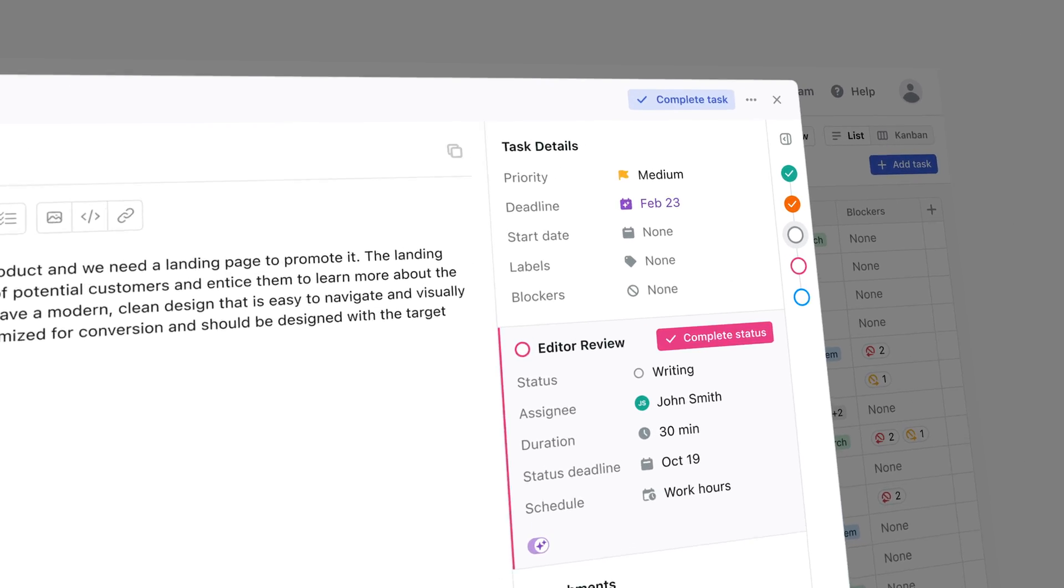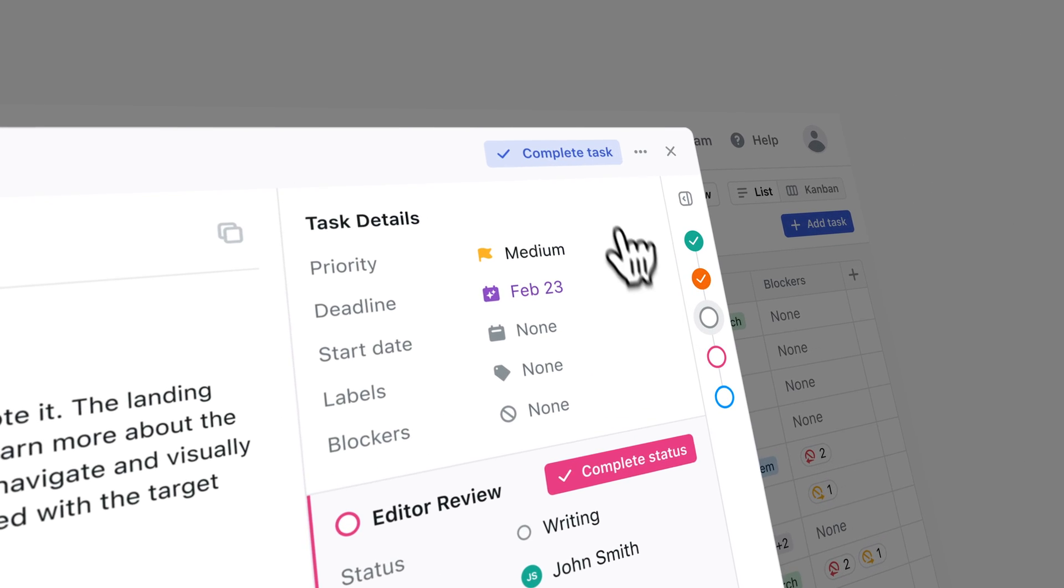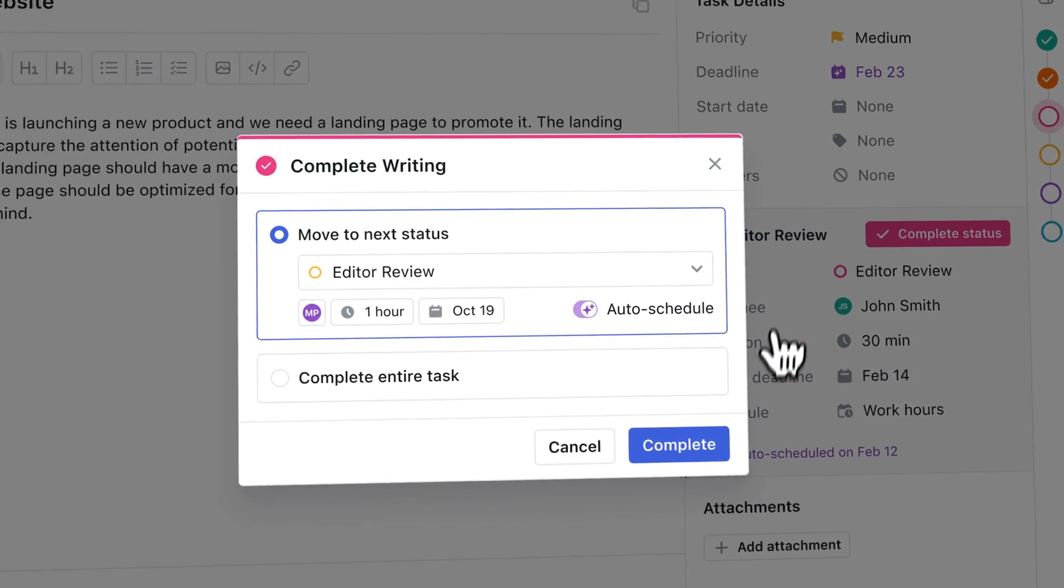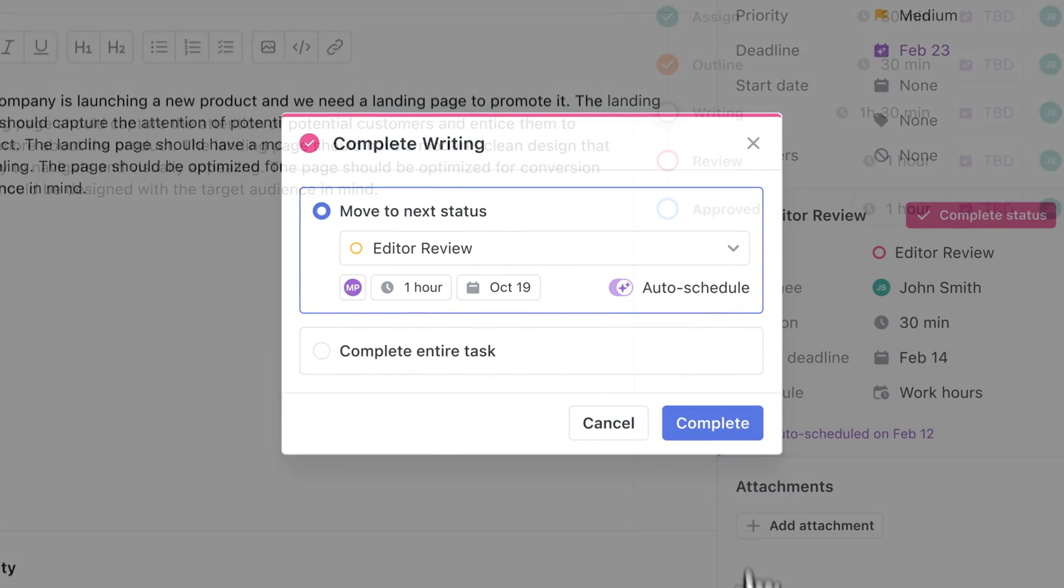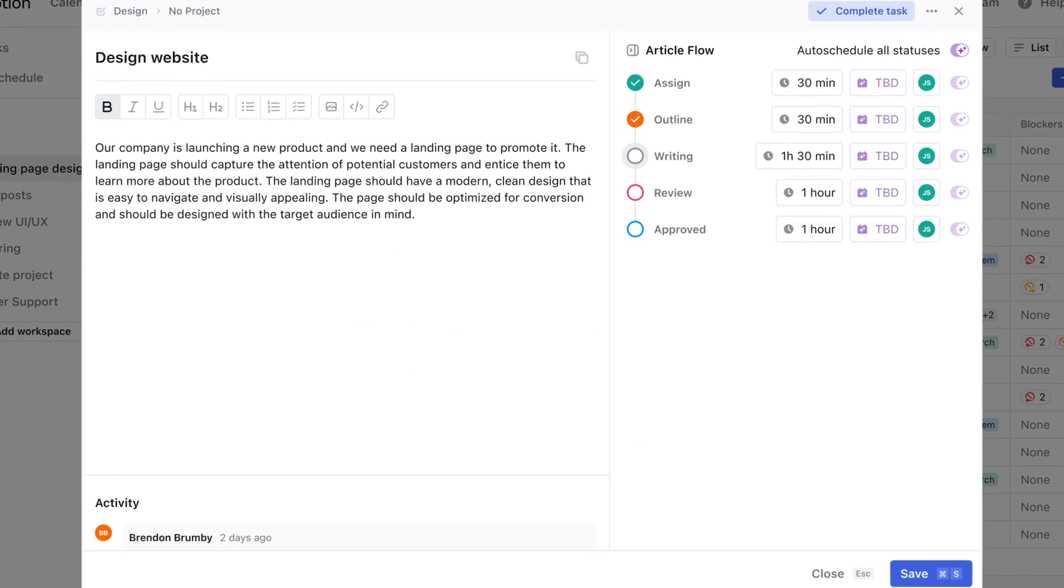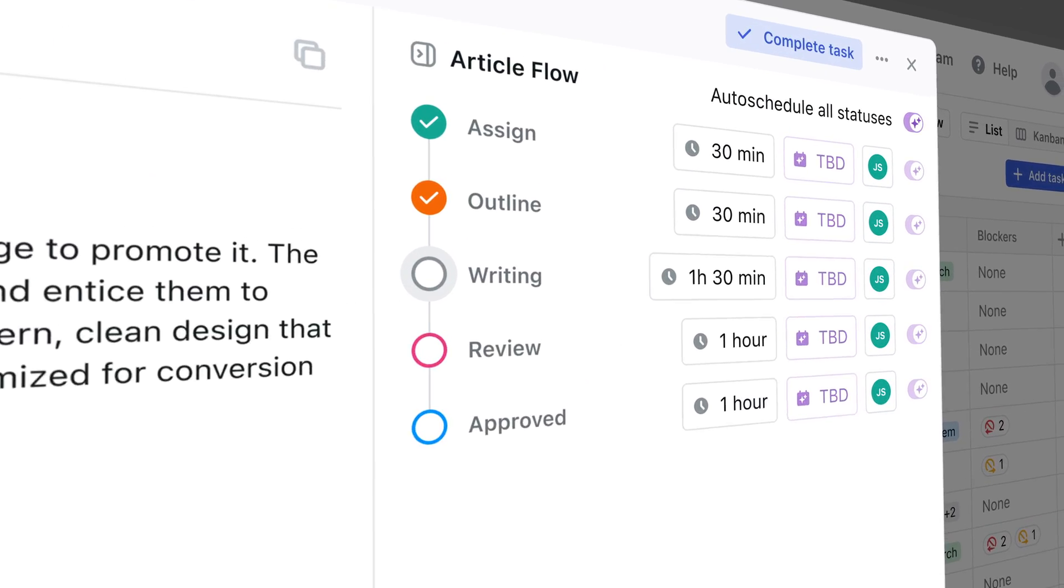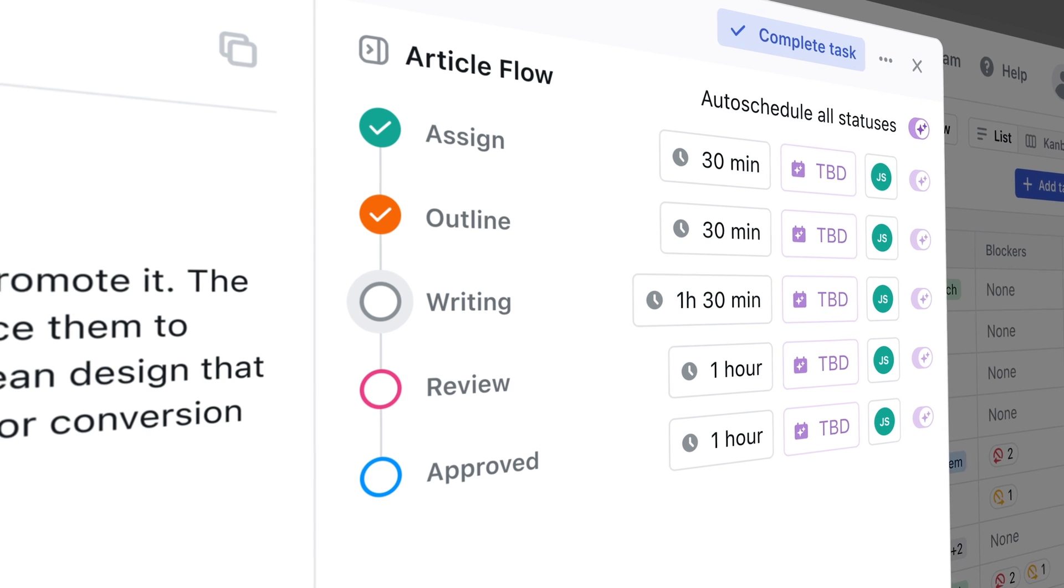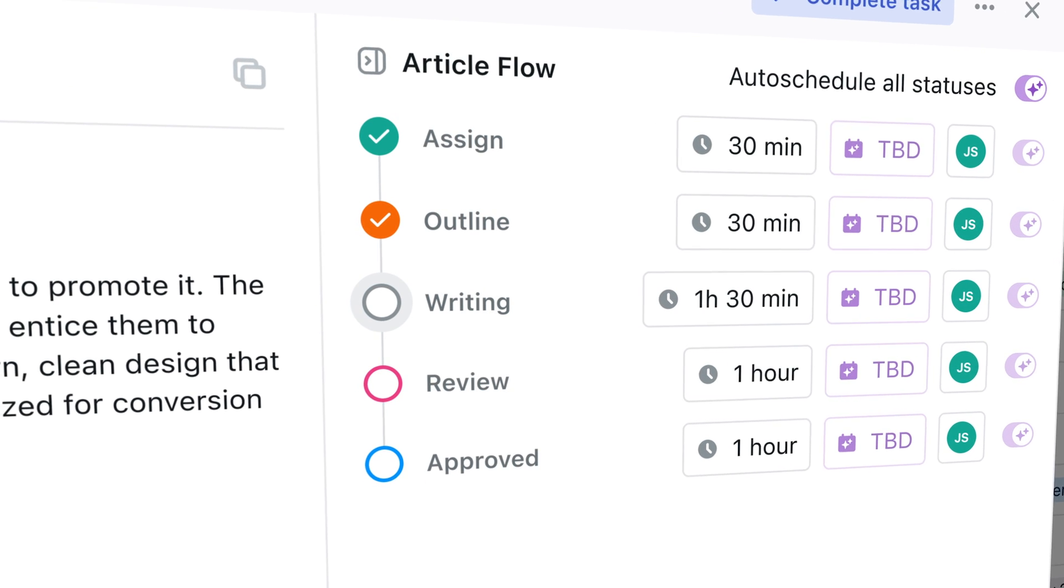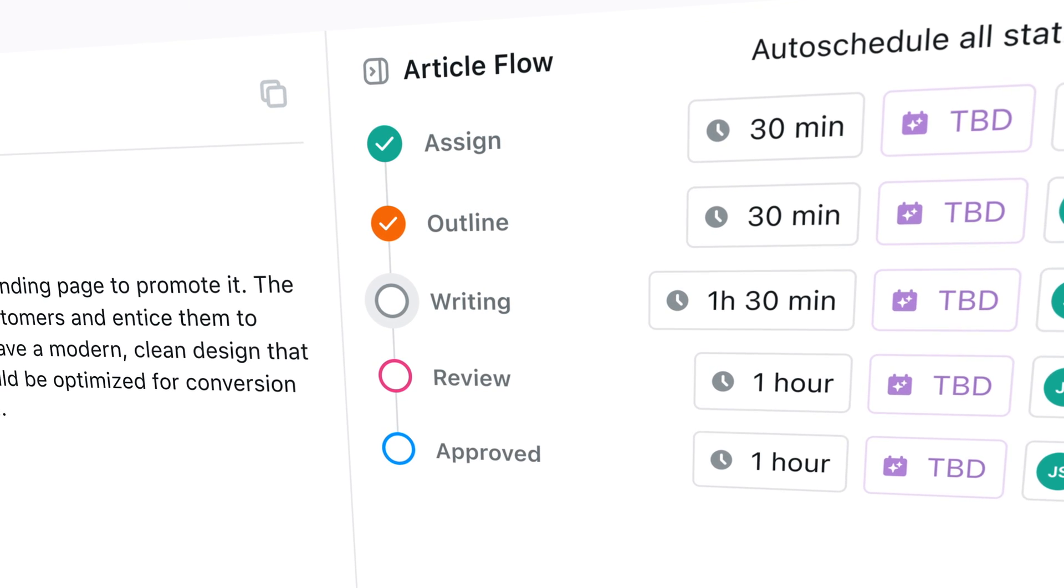So the task is on your calendar the same way as every other task is on your calendar. But when you mark it as complete, it will actually move the status to the next status that the task needs to go through. And along with that, it assigns it to the appropriate team member, throws it on their calendar, and then actually sets the duration of that.